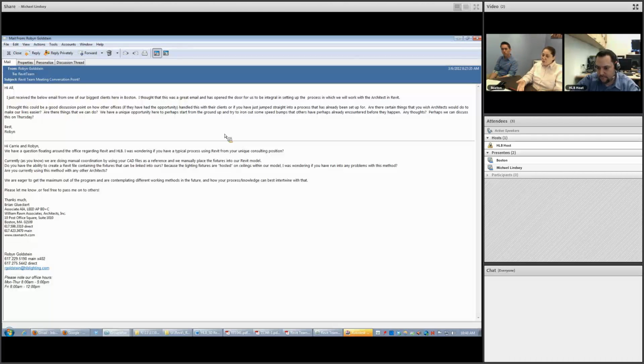Yeah. So with the staggering, it's an additional level of staggering. Like in CAD, when we work in CAD, we need to get our work done before the engineers can get their work done. So the architects need to get their work done before we can get our work done. So, they touch the model, then we touch the model, then the engineer touches the model. I don't know how that's going to work on Google with such a compressed time schedule, but on a normal project, I could see that